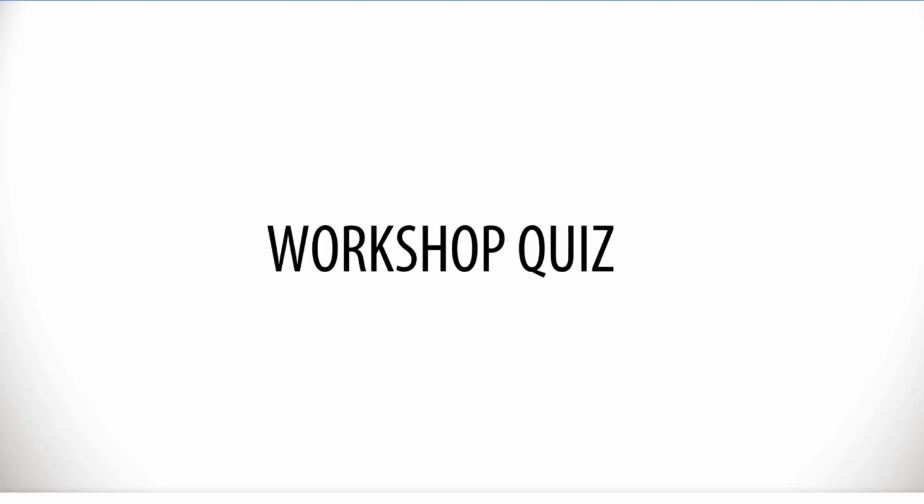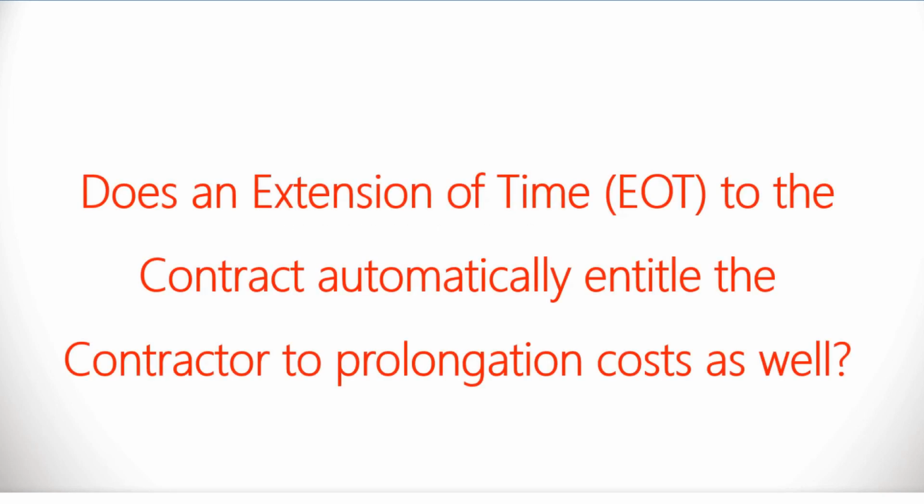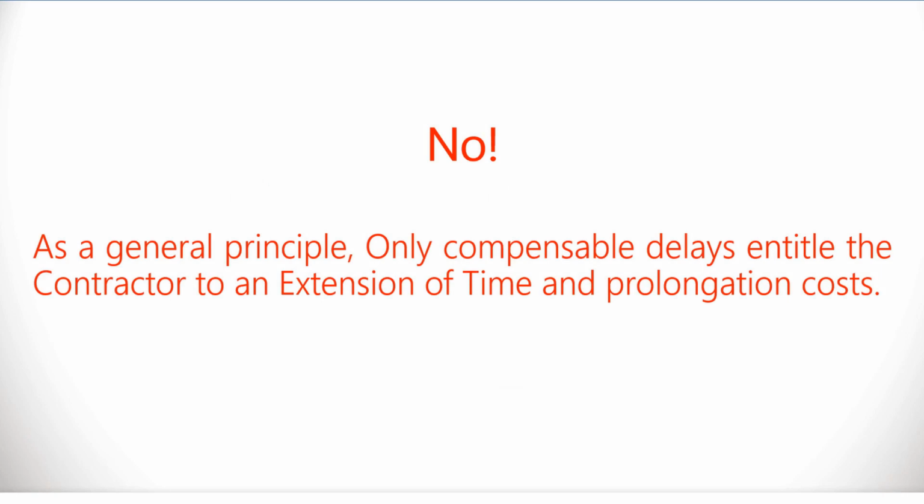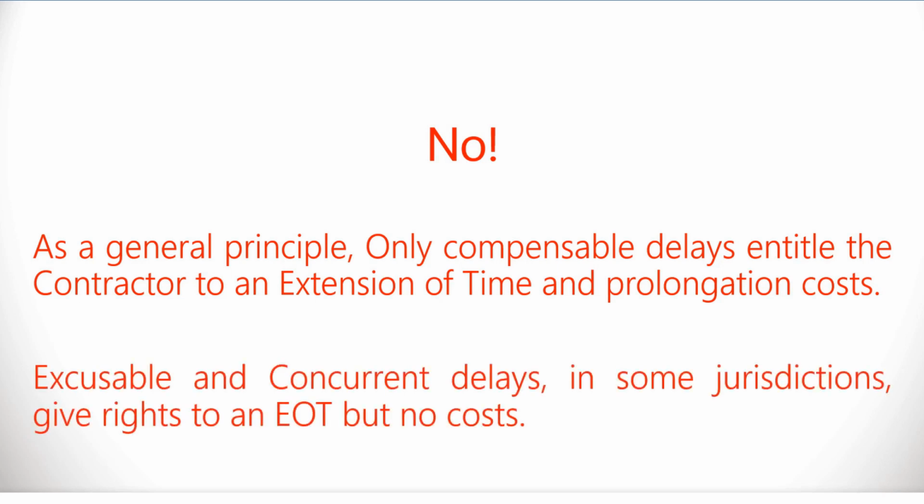Here's a question for you, just to check your knowledge of construction claims. Does an extension of time to the contract automatically entitle the contractor to prolongation costs as well? Please pause the video if you want to have a think about it. The answer is no. As a general principle, only compensable delays entitle the contractor to an extension of time and prolongation costs. Excusable and concurrent delays in some jurisdictions give rights to an EOT but no costs.